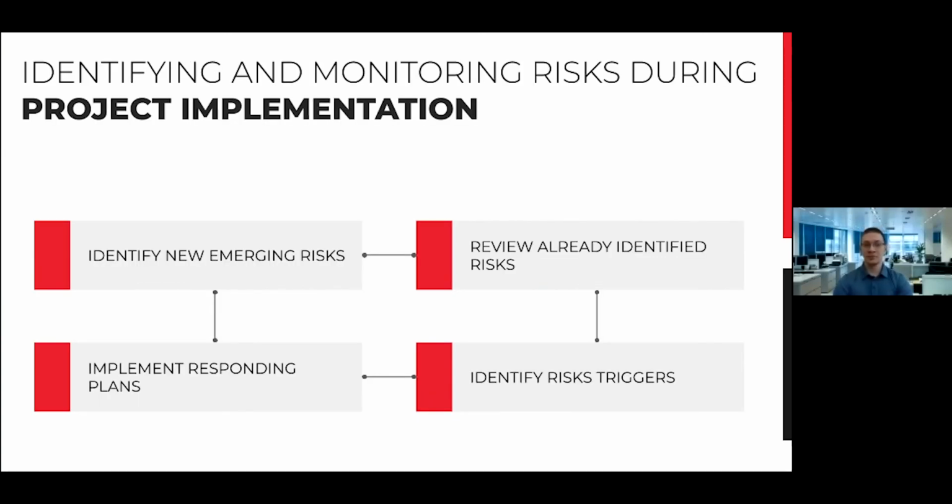So you got the estimation and started the project. Is the risk management process finished? Certainly not. The time is going. The environment is changing. Our project knowledge is increasing. For those reasons, some risks become not relevant anymore. Some risks change their probability and impact, and some new ones appear. We need to continue the risk identification process.